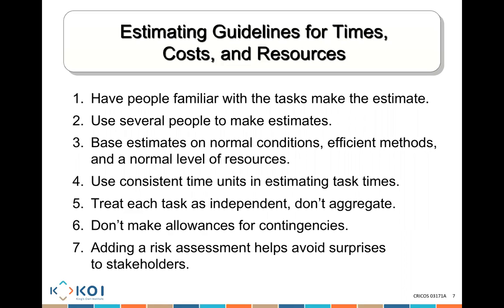Use consistent time units in estimating task times. For example, don't estimate some tasks using days and other tasks using hours. Use consistently. If you're going to use days, use days. If you're going to use hours, use hours. But the unit you are going to be using needs to be consistent in terms of estimation.